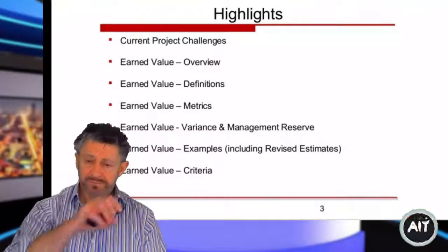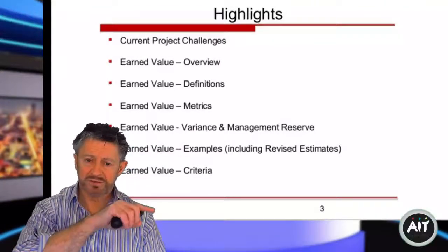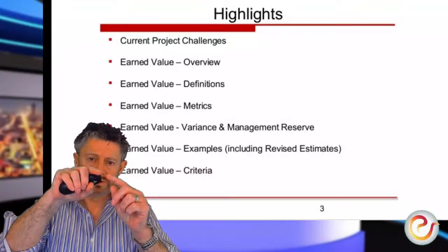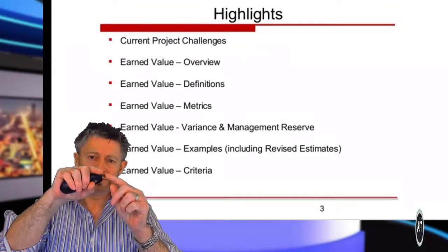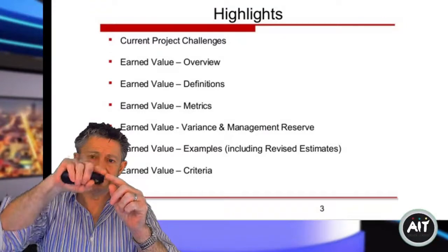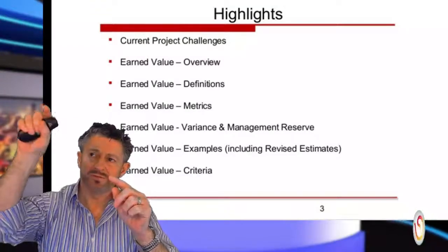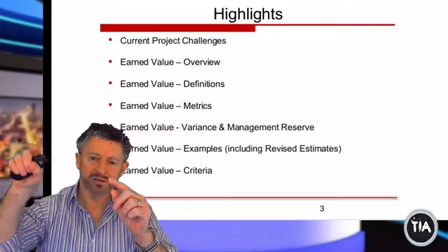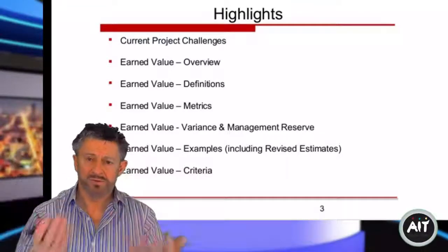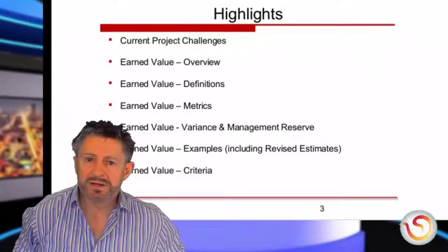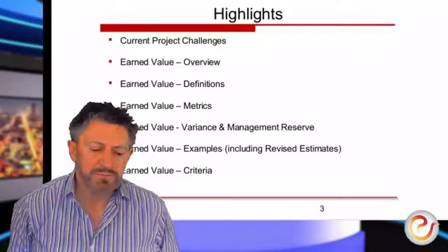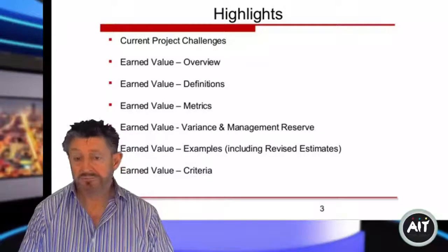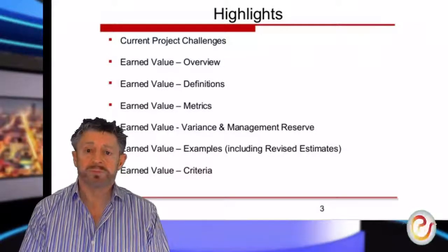So how this looks graphically, you'll have the original budget, and now you have the remaining work revised, so you add it to your original budget and it comes up. So the finishing point is going to be slightly higher. The labor cost will be slightly higher than your original plan, and that's a revised budget. But we trap that, and in your project note you see revised budget due to a 2% increase in labor costs. So we know why, so it makes perfect sense.